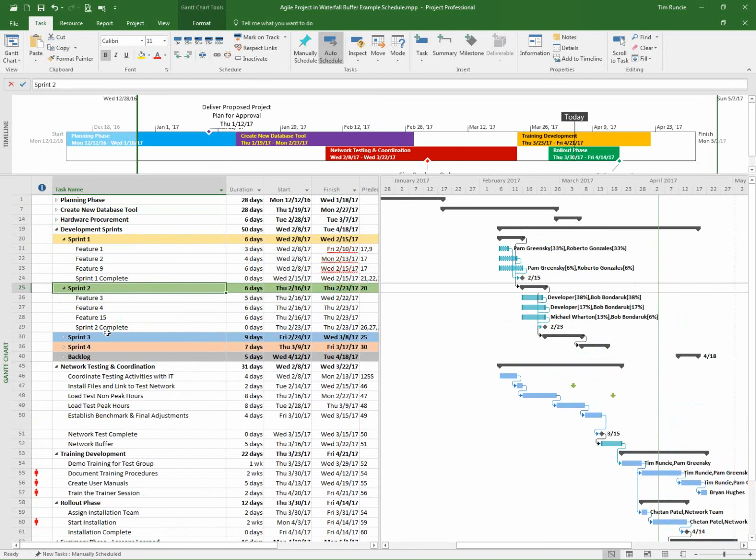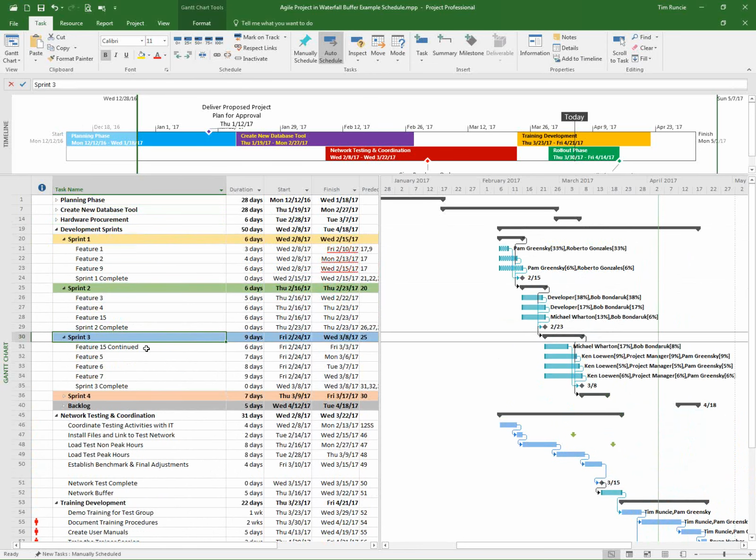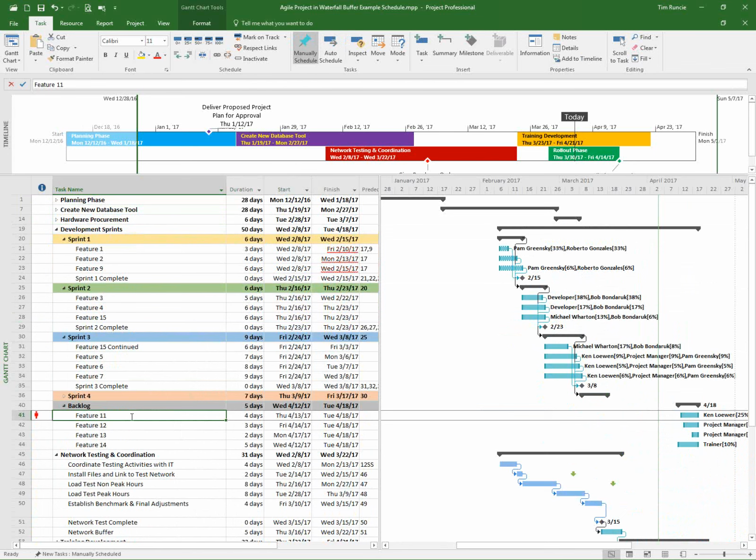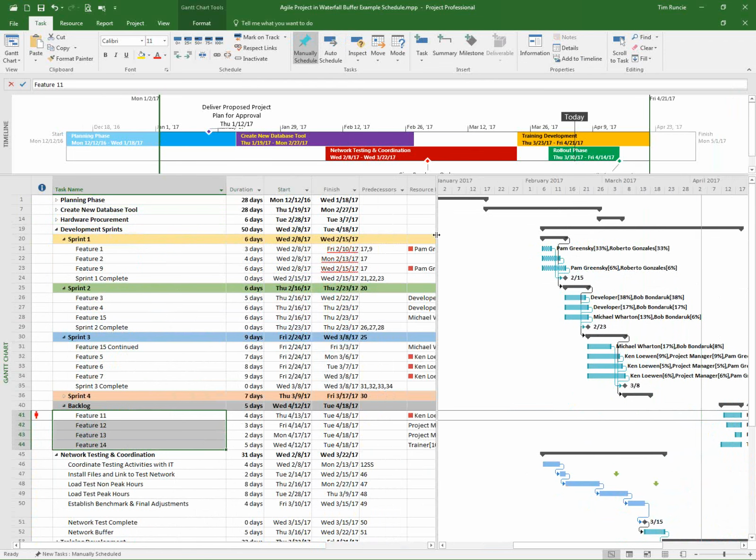So in some cases where we're looking at our overall float and our buffers, you'll find that task, for example, row 28 here, where it says feature 15, maybe we can't get this done. Where do we put the extra activities or the work or the task information? Well, that normally in an Agile process gets called out and moved to the backlog. And again, it'll be estimated and reprioritized as you move through that process. So in many cases, you literally could be breaking off a row, dragging and dropping it, or moving it between there. However, the idea of including what we call story points is helpful.